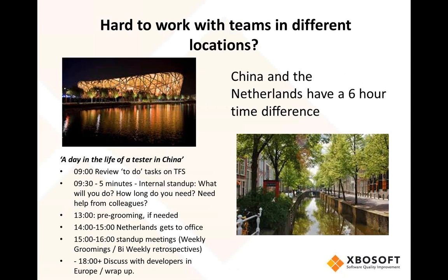Between 3 o'clock and 4 o'clock, we have the daily stand-ups. Again, this is about 5 minutes per team, so this is not the whole hour, but we have 6 different teams. Daily stand-ups were attended by both the developers in the Netherlands and Romania and the testers in China. We tell our colleagues in the Netherlands what we have done, what we have found, whether we have found any new defects, whether there's anything they need to pay attention to. They tell us what they are going to do that day.